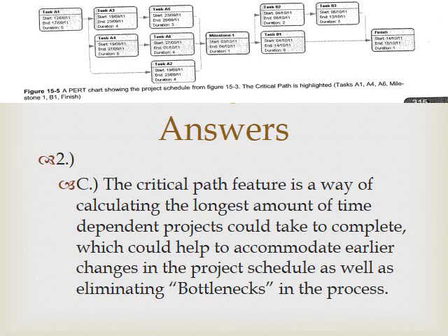But nevertheless, the difference between the PERT model and the Gantt chart is that the critical path model can analyze more about the order and the relationship of the tasks. Not only how long they will take, but also how long with respect to each other. Which tasks rely on each other? Which task can't we start before we finish this one? And so it really helps not only to analyze the time, but to order them in the most efficient method as well.